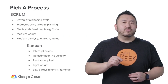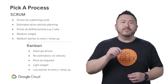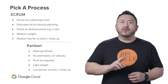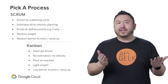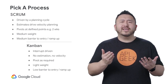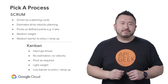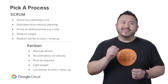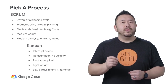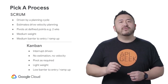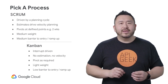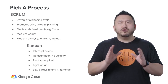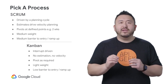Now that we have a higher level approach down, let's dive a bit deeper into the agile process. There are two common variant processes in agile: Scrum and Kanban. Please take a moment to read the descriptions. While Scrum has more processes with more steps to take into account, the cycle of development is more familiar to many teams and more friendly for new teams being formed. Kanban, although easy to pick up, relies on work that is smaller chunks of effort and less dependent on other work.